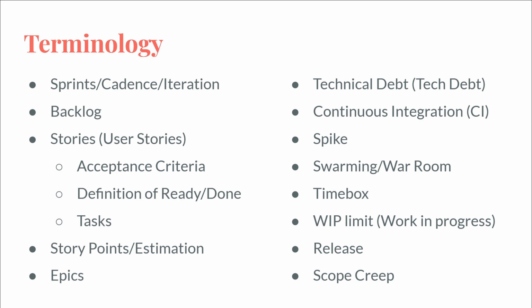And that 8-pointer could have maybe been turned into several, two or three, maybe three pointers, and a 1-pointer or a 2-pointer. It could have been broken down to smaller, easier to do chunks that could have been done quicker and been easier to review. So that's the idea of scope creep.